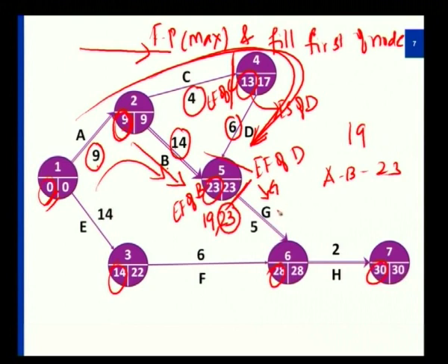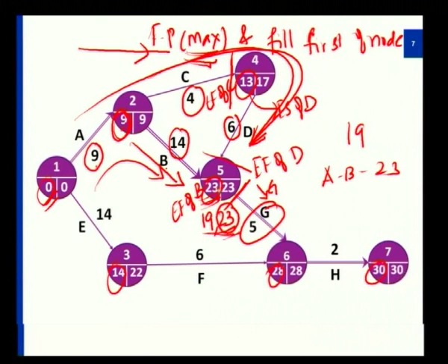I do understand once when I started with G, this requires a prerequisite of both B and D. So I can start with G only after 23 weeks. Now that is the specific reason why I have hinted with 23 here. Now going back, in the forward pass, I have mentioned a point which is called a maximum value. Now you can understand the maximum here of these two values following two different paths is 23. So that is why I have indicated maximum.